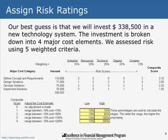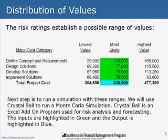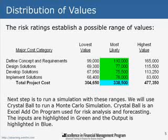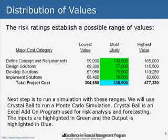For example, if we had a risk score of two, the single-point cost estimate for that component would be 10% less on the low end and 50% higher on the high end. Once we understand these ranges, that creates what we call a three-point cost estimate, or a triangular distribution. For the phase 'Define Concept and Requirements,' the low end — best-case scenario — would be $99,000; the most likely estimate was $110,000; and the worst-case scenario is $165,000.